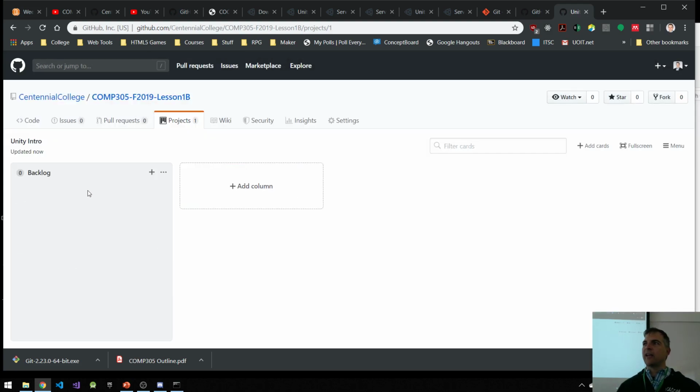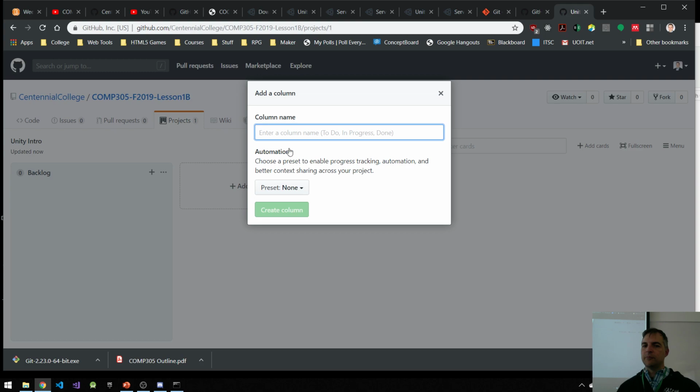Think about the backlog as every possible feature of your game from now and for the entire length of the project, from now until the end of semester. What could they be? You can add in a bunch of different cards or notes. So each one of the features you can list here. Okay? And then I'm going to have another column for to do.